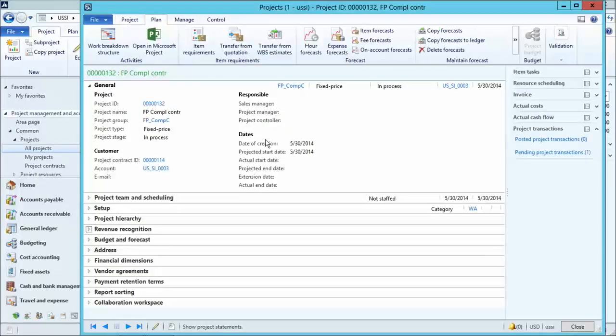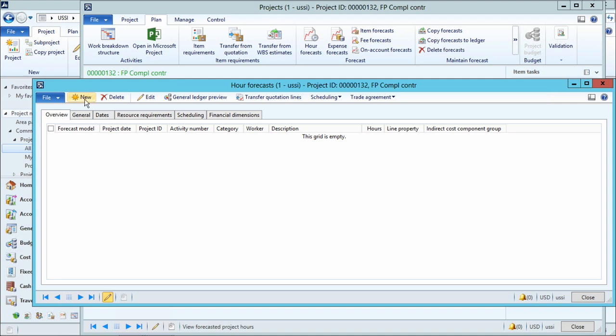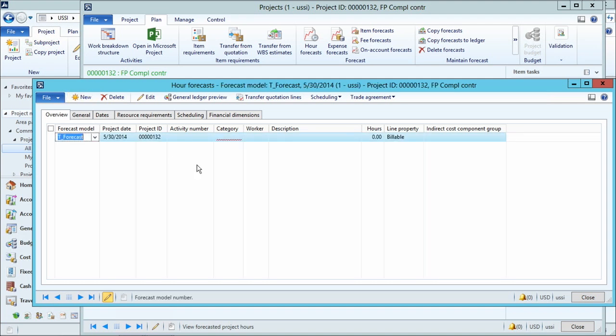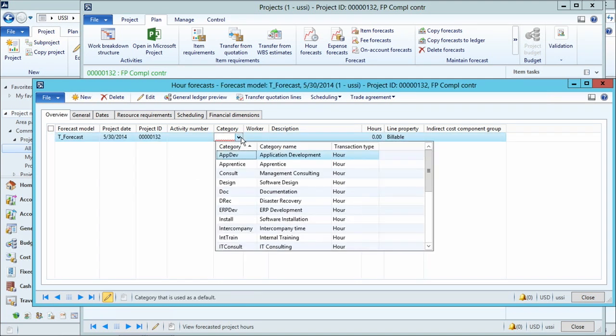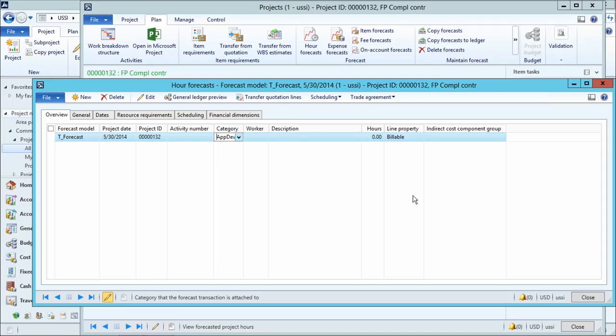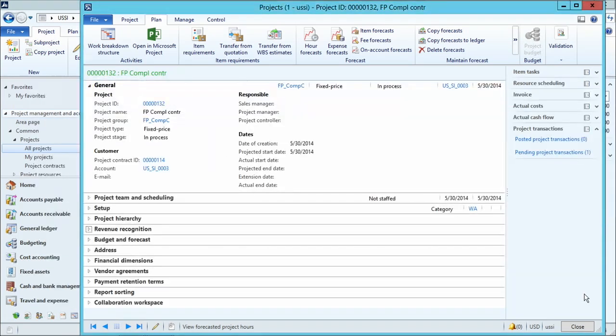The other thing is, remember the cost template that we're using is a budget to actual, so we need to establish what that budget looks like. When I do my calculation, this would be the denominator. Let's say, we're going to do a very simple one, it's going to take 100 hours of application development to deliver this project. All right, so we have established the contract value, and we've established a forecast to measure our results against.